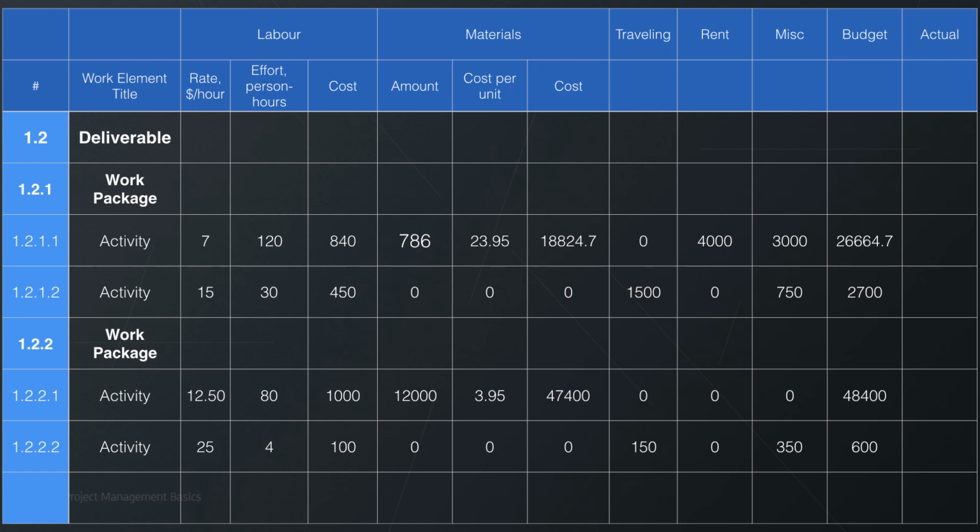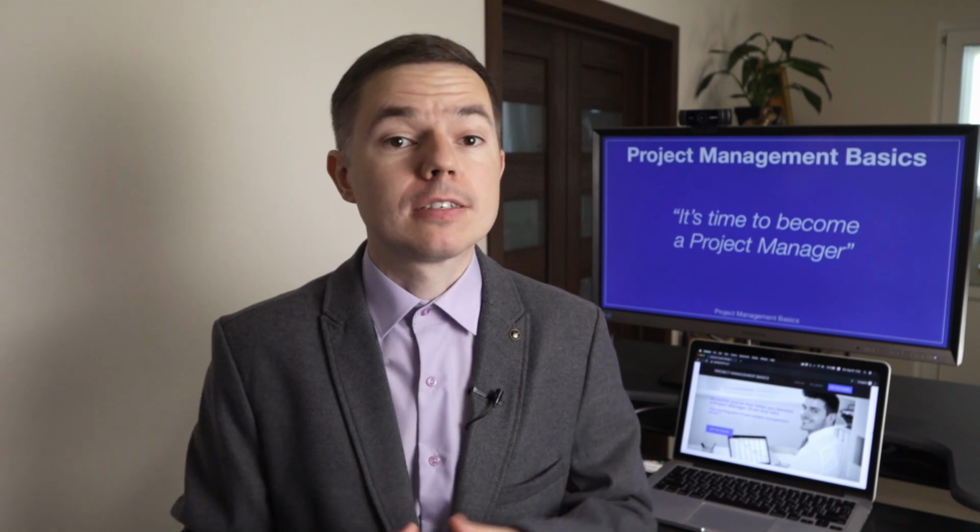As for the rates, your company should have a list of possible prices for labor you use in-house on a regular basis. Or there's a list of vendors with their price lists. So the first step is always to ask your leadership. Otherwise, you need to research the market to find out average rates for the required roles. Also, you may need to look into the freelancers market to assess possible range of rates. Keep in mind that rates that you use here will directly impact the hiring process. If you put it below the market average, it may take more time to fill in the required position.